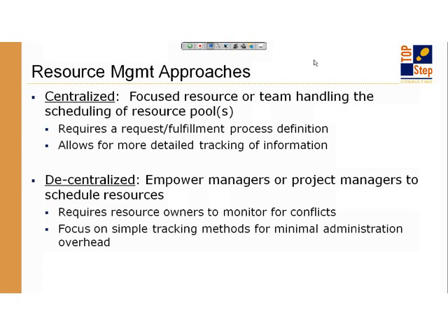This type of approach tends to require more monitoring and is more reactive because it does increase the probability of conflicts. Those high-demand resources get grabbed by anyone, and unless they're being diligent and following the procedure, it could possibly mean that everyone's grabbing John Smith, and John Smith suddenly has to work 65 hours in a single day, which until somebody figures out how to change the hours in a day, is impossible.